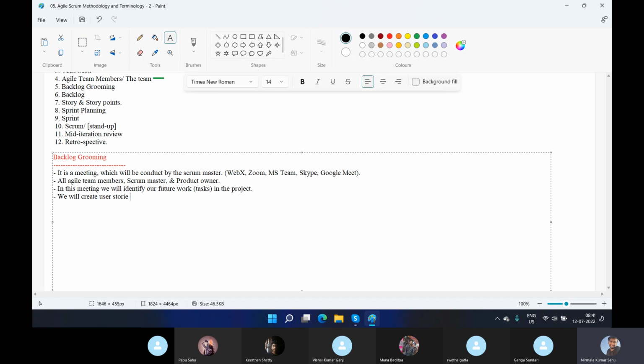When I create another thing, that is called a task. I will create a task and assign it to Pappu: Pappu, it is your responsibility to create the repository and give access to everyone. Generally, your tech lead or scrum master will create all these things. So consider Pappu your tech lead. I assign a task to Pappu: Pappu, this is your task. You have to create your repository and your project structure. If Munna said, Nirmal, you have to do that, then that will become a story. When I create a task and assign it to Pappu, that will become a task.